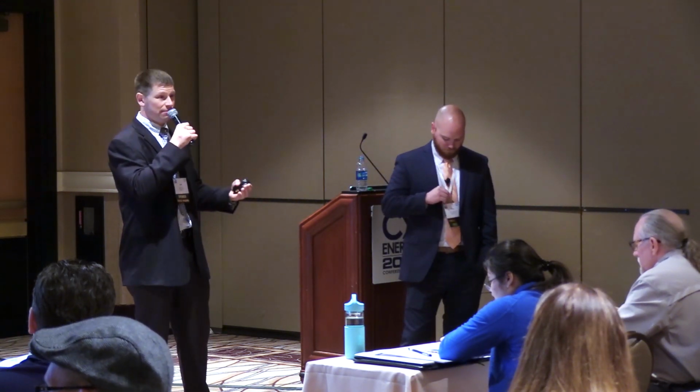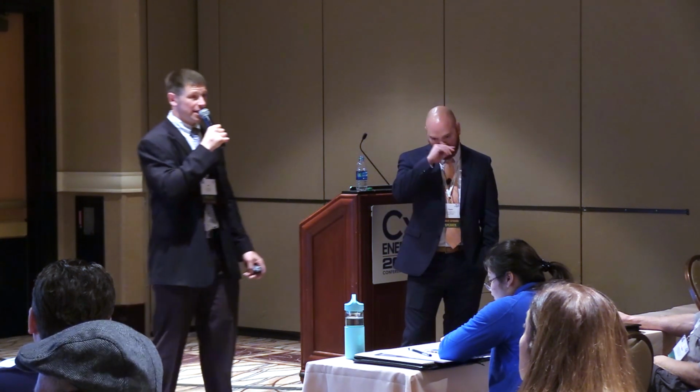But the whole idea here, especially with the energy conservation measures, is we're trying to prove a return on investment. We want to show these guys, hey, if you do this, this, and this, it's going to save you all this money, and it's pretty much going to pay for itself in 5 years. And the whole point is, a lot of times they'll go directly to the department. So in a chemistry laboratory, they're going to go to the chemistry department and say, hey, you can invest this much, and within this many years, you're going to get your payback on this. And that's really what sells the whole project, to get this stuff done and get these facilities fixed and running right. So these are your big deliverables, your ECMs and your FIMs.